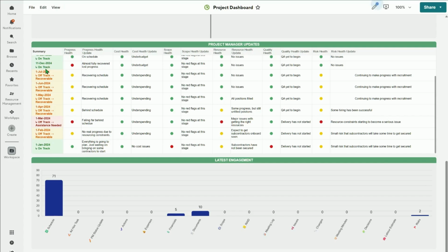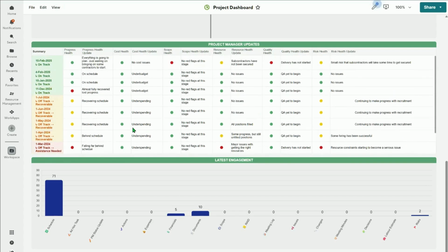They wanted to be able to see the historical updates, so that there was less incentive for a project manager to say everything was going great and then, just at the end of the budget, say, well, actually everything's poor. It drives a culture of project managers indicating issues early rather than hiding them or hoping that things will just sort themselves out.